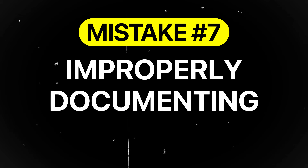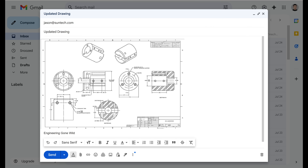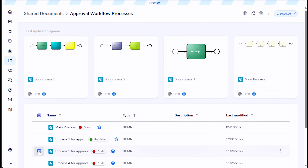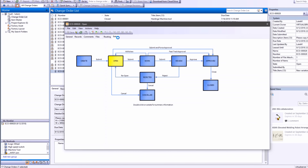The next category of mistakes is about organizational and documentation failures. Mistake number seven is improperly documenting and tracking design revisions and changes. Without disciplined revision control, outdated parts can end up being manufactured. I've seen cases where engineers emailed the updated drawing to the supplier but forgot to update the revision letter. Weeks later, the supplier produced the old version still stored in the PLM system, resulting in very costly delays and scrap. Always follow your company's procedure for updating revision levels and document every change through engineering change orders or revision tracking logs. Be sure to fully understand your organization's standard operating procedure for managing design revisions and part numbers.